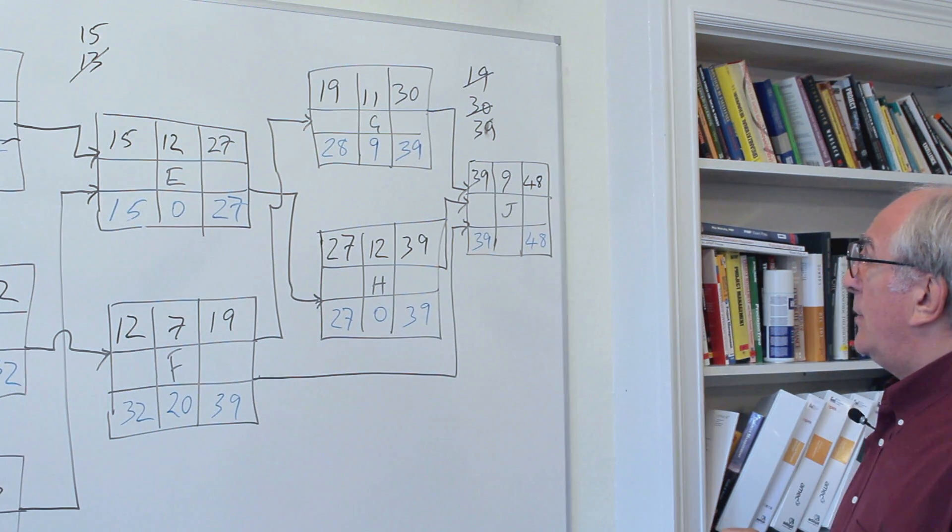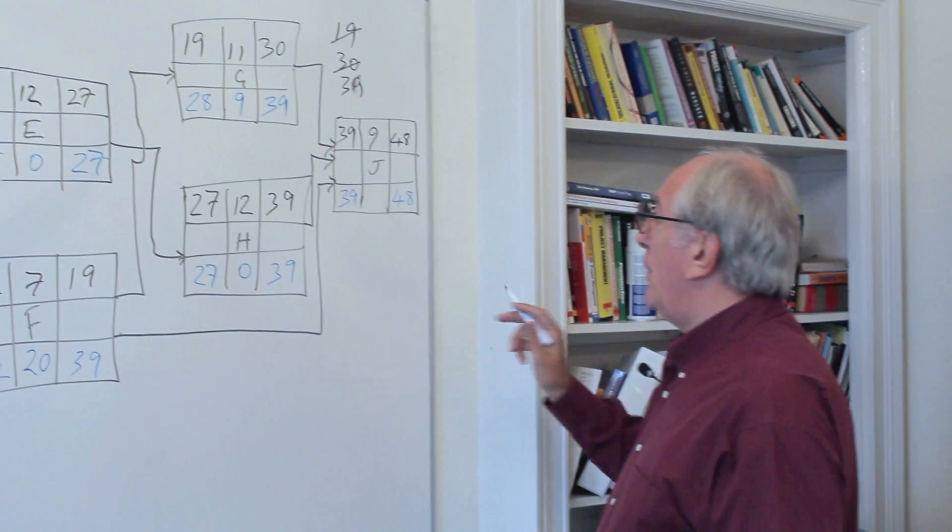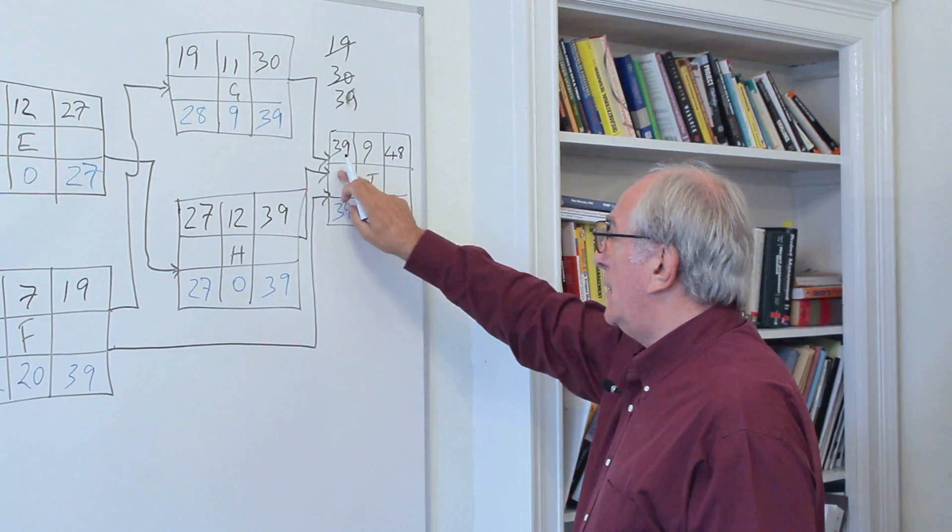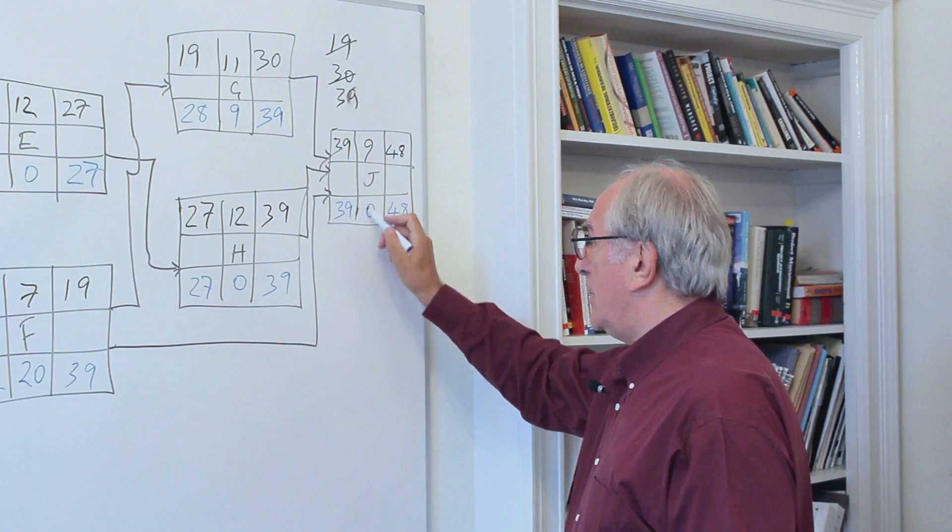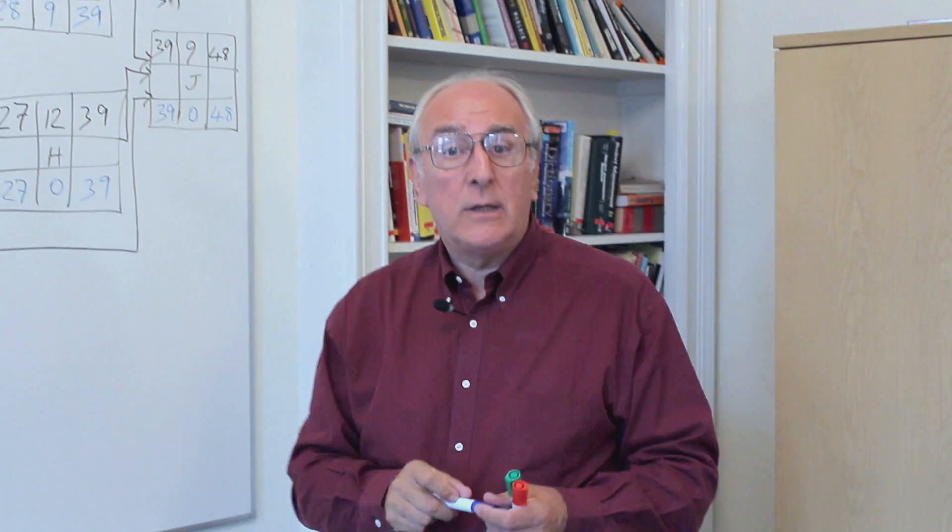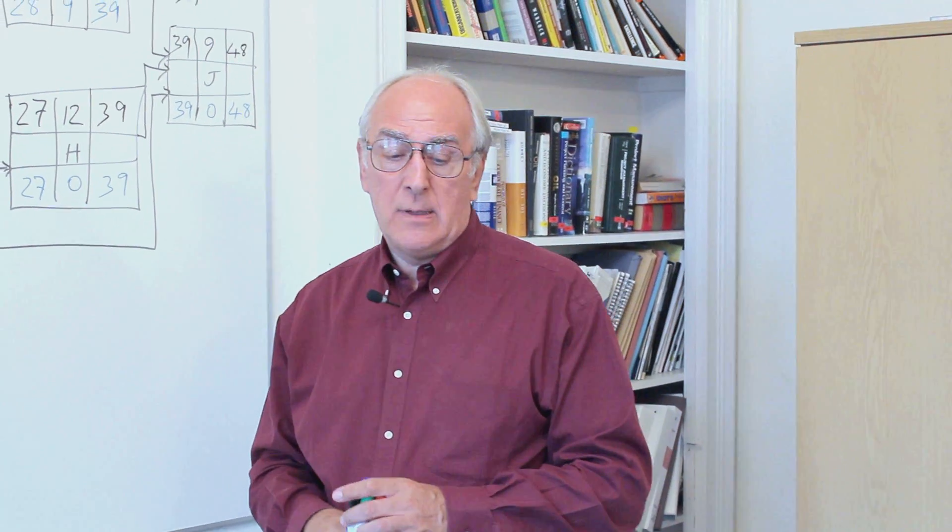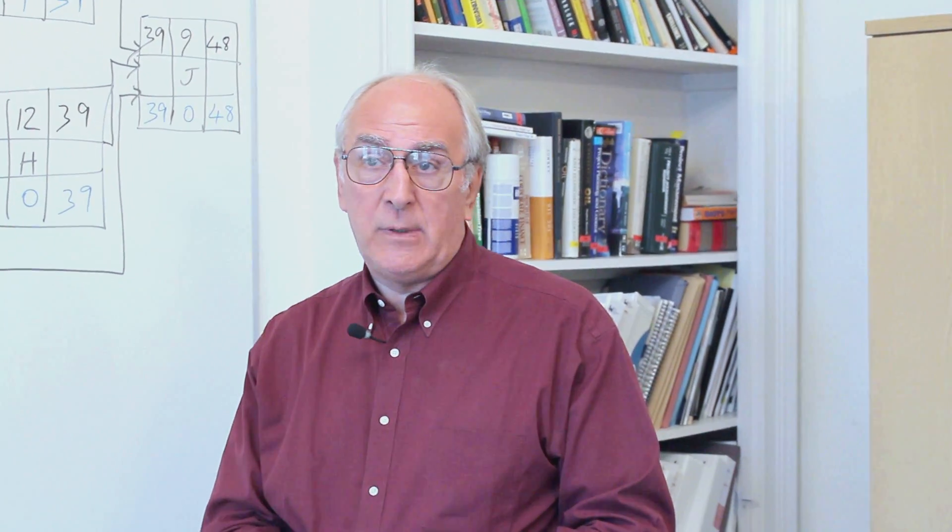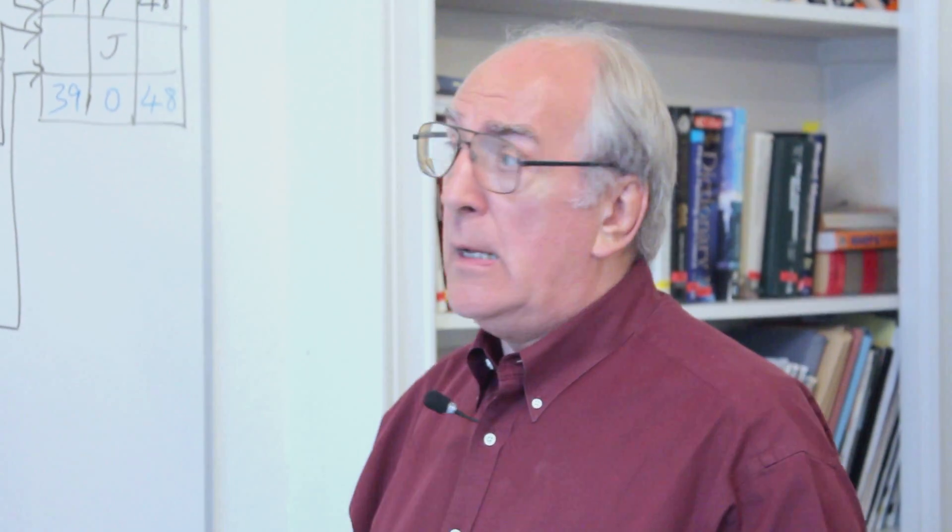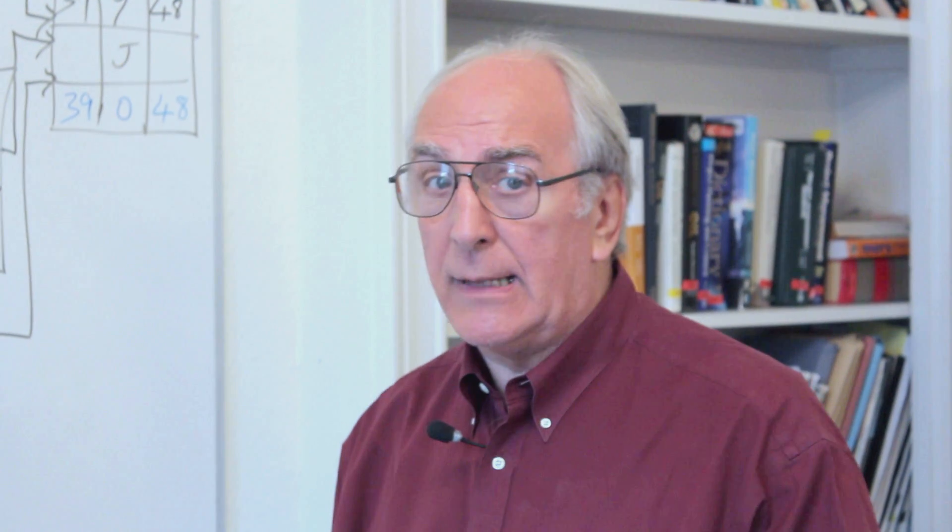Now the last activity: we've got to float on that one, it's going to be forty-eight minus thirty-nine minus nine, which is zero. So what do we conclude from this? Well, those activities with zero float are known as critical activities, and those critical activities means that if there's any delay in any of those activities, then the whole project will be delayed. And the path of those critical activities is known as the critical path, hence the name of the technique: the critical path analysis.